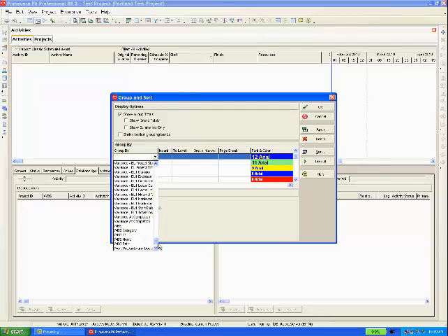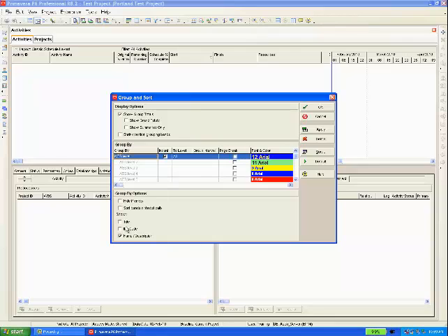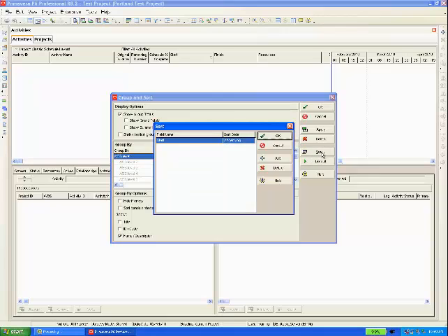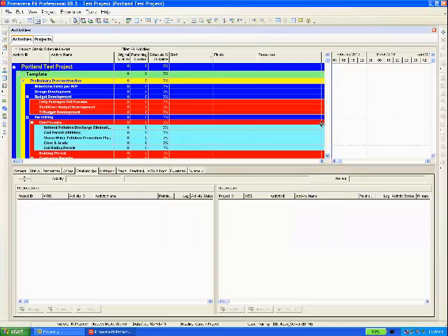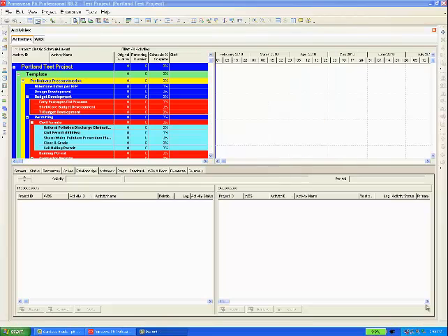So we'll go down to the bottom, WBS. It fills. And then we want to come over here and click on the sort function. We want to make sure we're sorted by start in ascending order. This will give us our normal schedule view that we're all familiar with. OK, OK, and up pops our WBS.